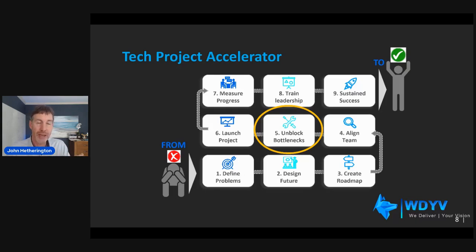But if you absolutely have to have a 2 in the box, where it's sometimes the client lead or company lead along with a vendor, just someone has to be nominated as lead, and that has to be the client or the company lead. The vendor can be closely working with the client lead, but ultimately someone has to have accountability, and that's the company owner, the project owner in the company. So decision making accountability is absolutely key.